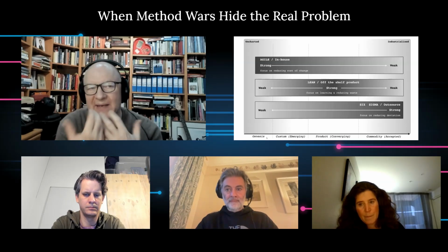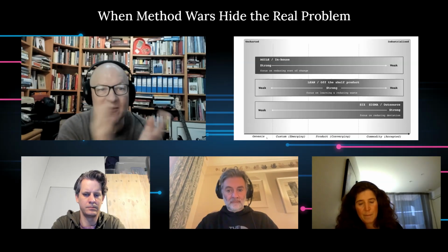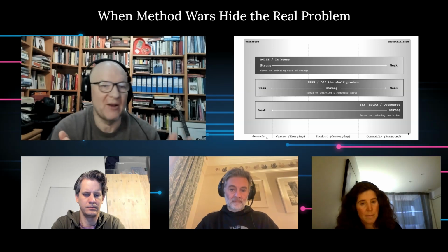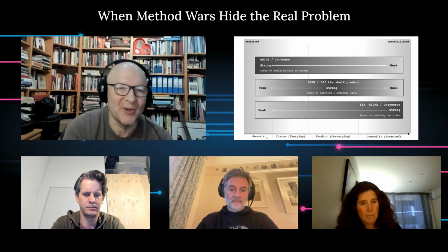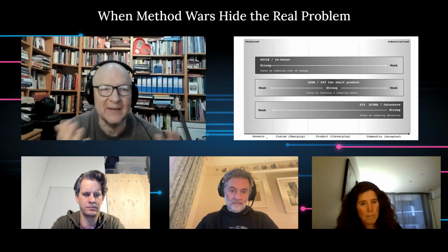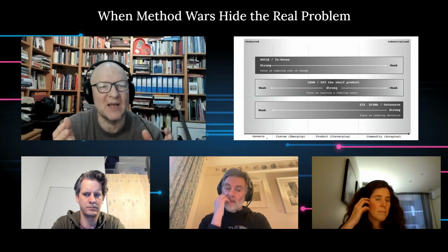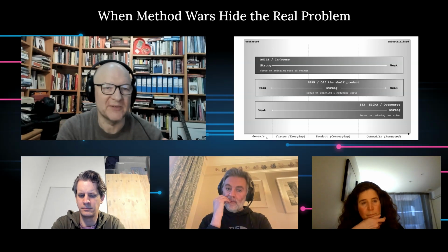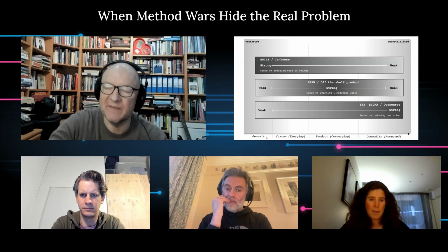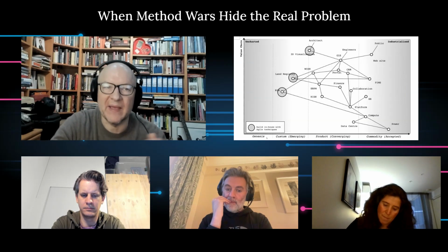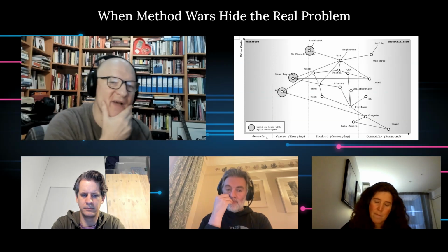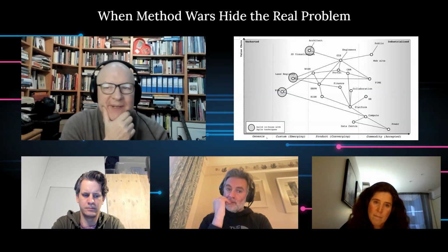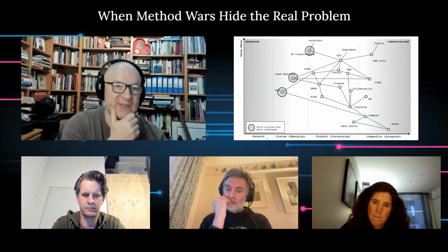So techniques like Six Sigma and outsourcing come to the fore. In the middle, you're all about learning and reducing waste. So things like Lean, Scrum, MVP, all that sort of stuff come to the fore. I'd learned back in 2006, you use multiple methods. If I apply that to a map, what you discover is on the left-hand side of the map, you should be building probably in-house with Agile techniques.